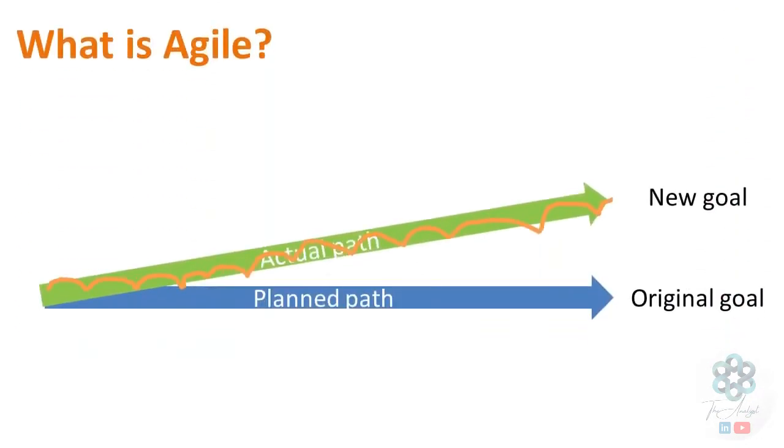The primary drawback of the traditional waterfall model was the inordinately long project duration. The second major drawback was that stakeholders typically saw the product only at the end of the project. Now what happens if we divide the projects into many short waterfalls? This is exactly what Agile does. Agile is essentially waterfall in short cycles.